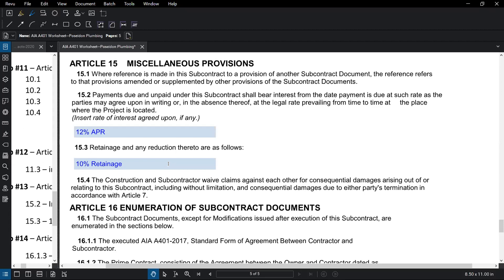Retainage is an amount - a percentage of what's due to the subcontractor or general contractor that's held back until a certain stage of the project. We're just going to say that we've got 10 percent retainage. We'll come back to this when we do our applications for payment in several weeks.